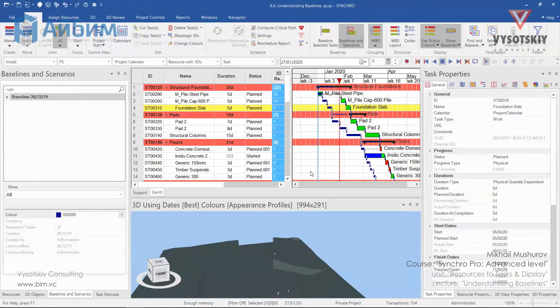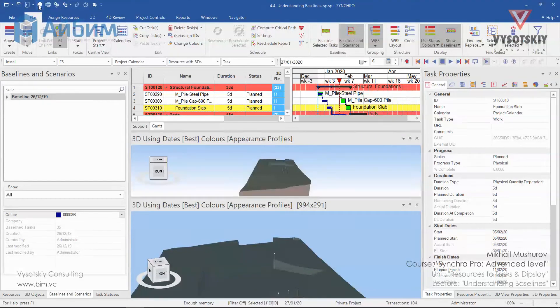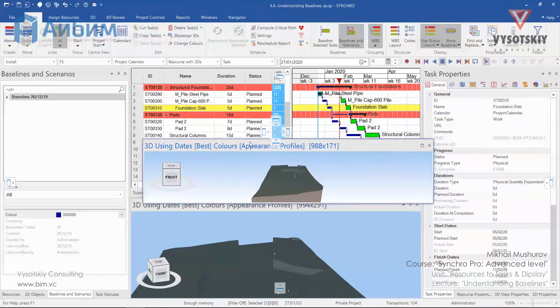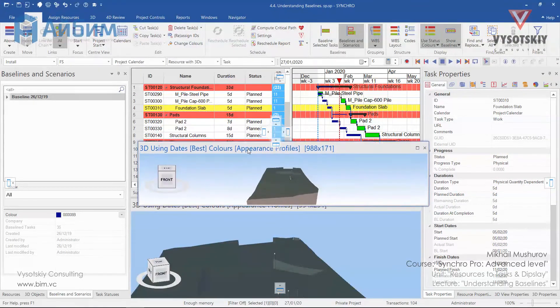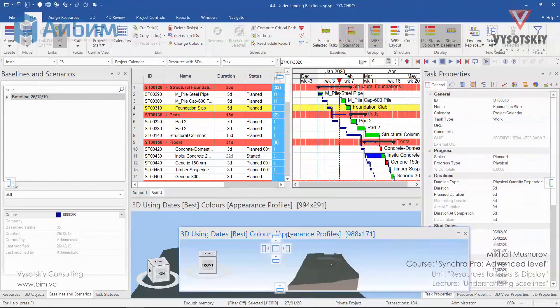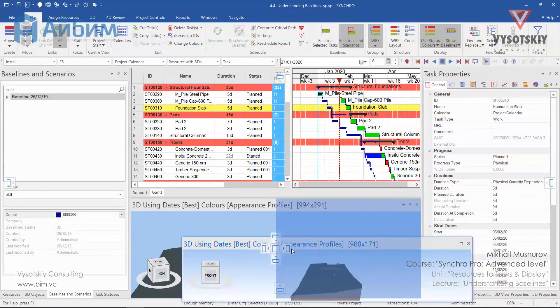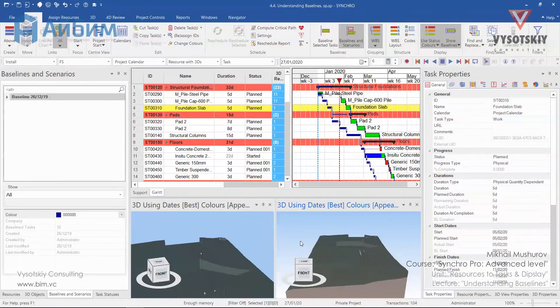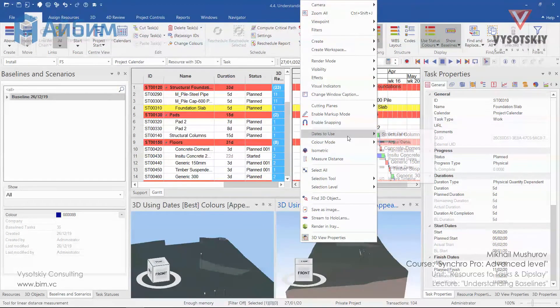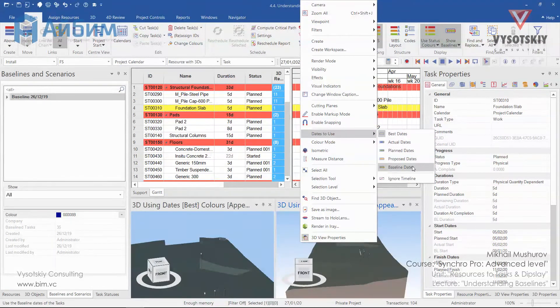Now let's visualize how this delay would affect our project execution. For that, let's open another 3D view. Click over the house on the quick access. By selecting and holding the left mouse, drag it down and locate it besides our 3D view. Make a right click over it, choose dates to use, and baseline dates.